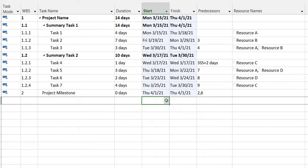So that's something that usually happens if you're moving a project that has partially been started. Moving project date is usually recommended for areas where the work hasn't initiated yet. And we usually move the entire project once we have visibility of a project start date changing from the initially planned date.